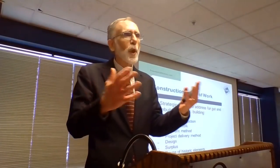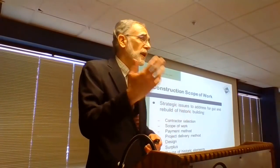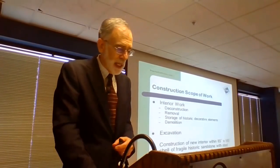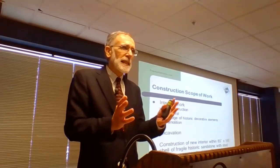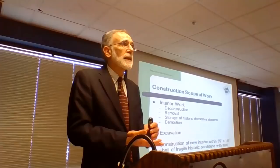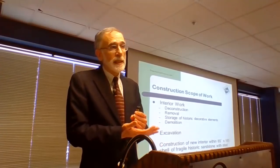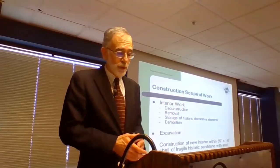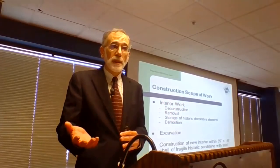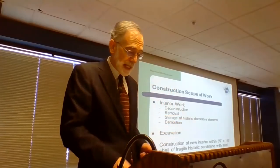So what is the scope of work for a construction project like this? These are some of the factors. We're going to talk about each of these in turn. So the scope of work is basically taking an interior project, deconstructing it, removing everything, storing and keeping items that are of historical value, and demolishing a lot of things. There's a lot of excavation because they want to dig down deeper.